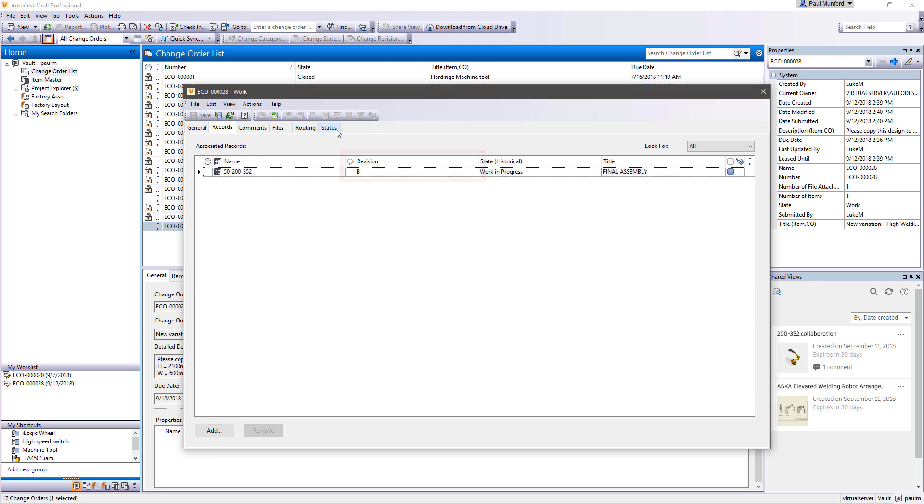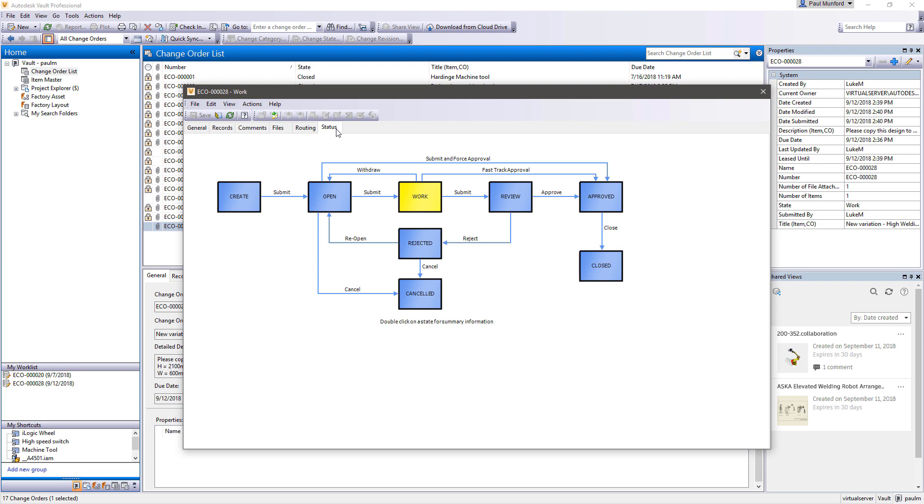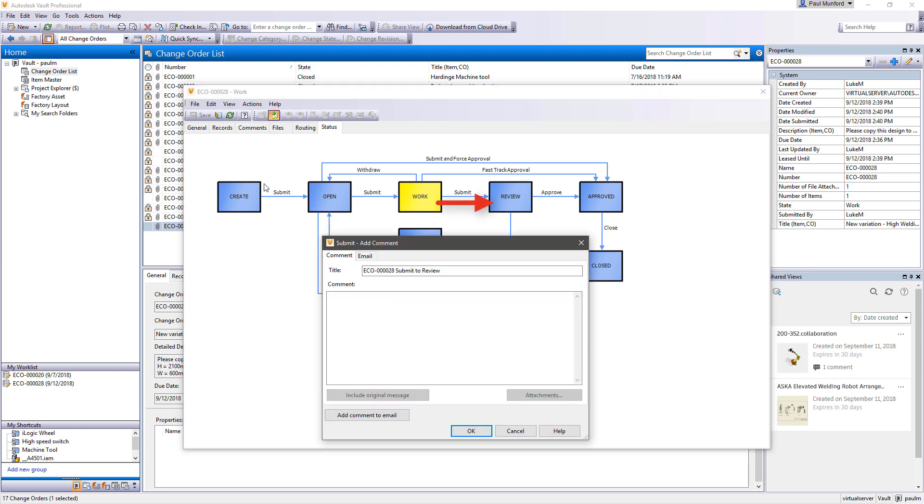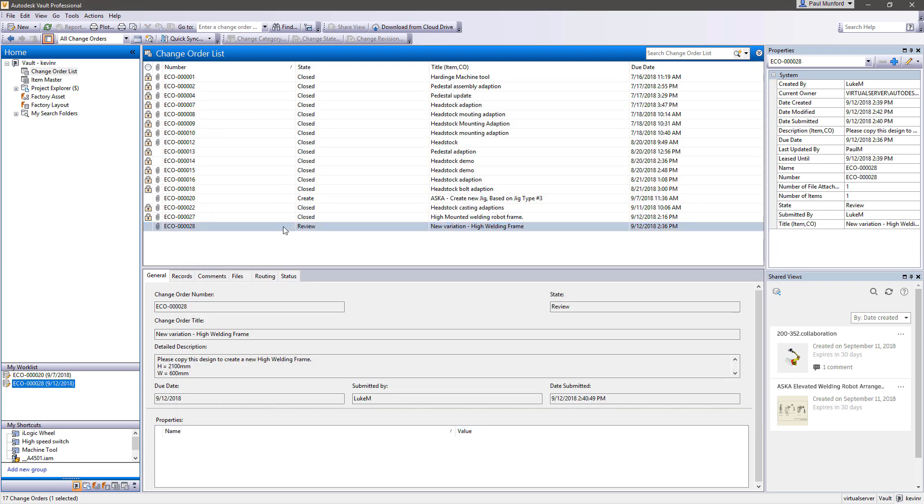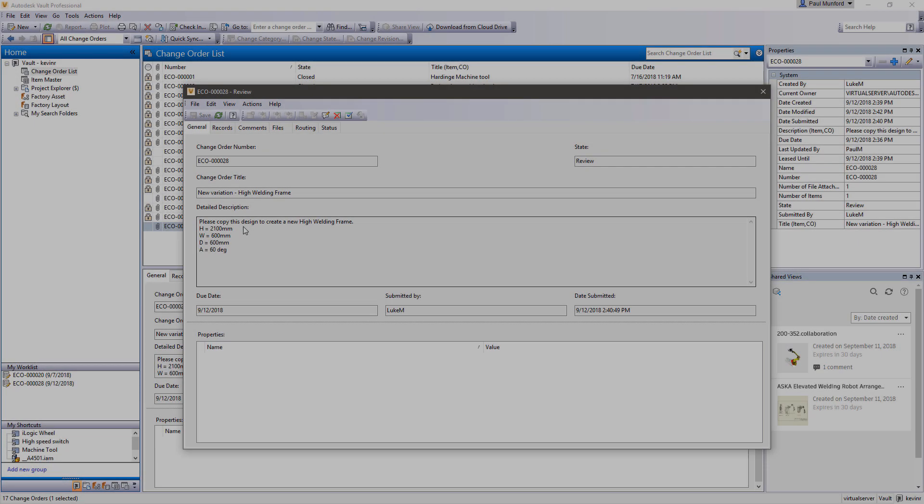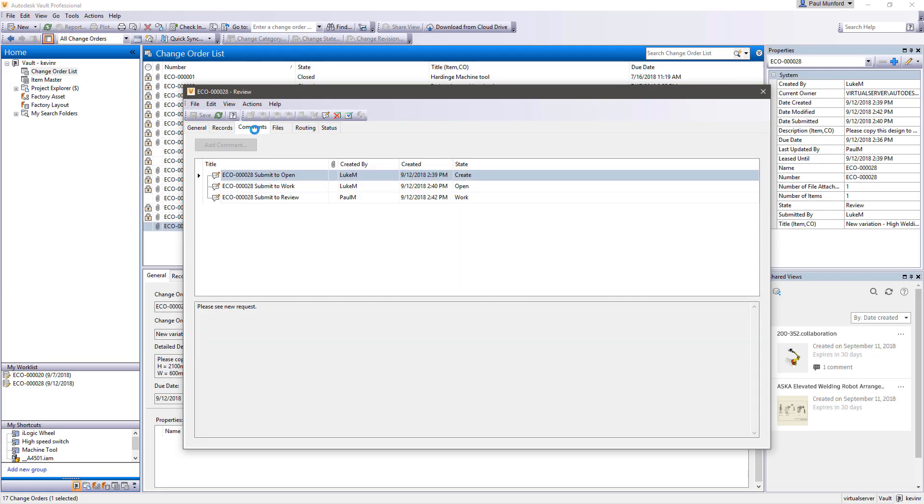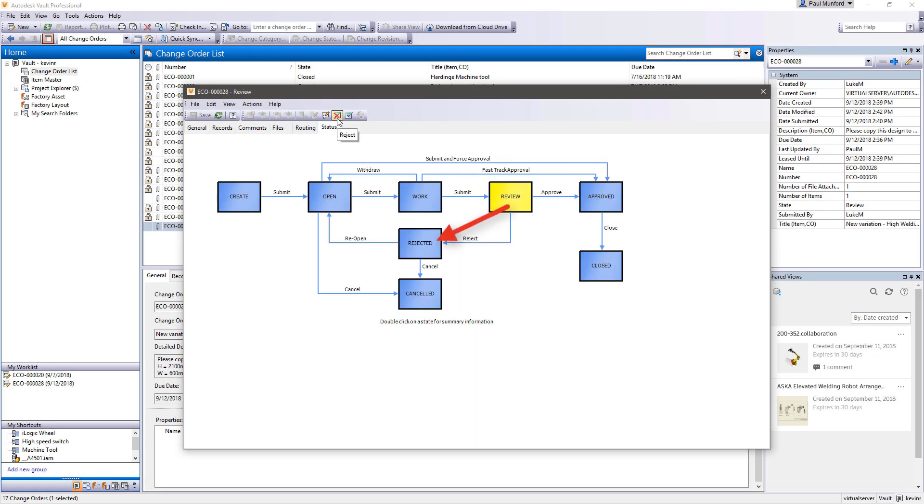Once design documents are edited to reflect the required changes, the change order is processed to the appropriate state. And once changes are verified complete, a final approval is given and the change order can be closed.